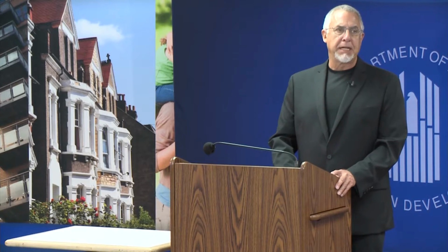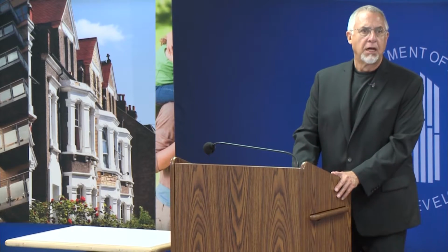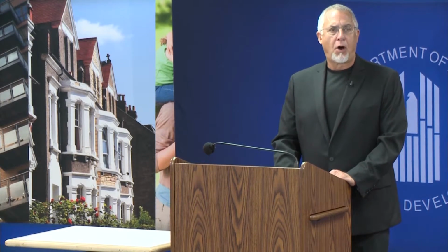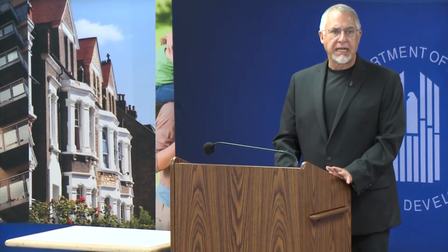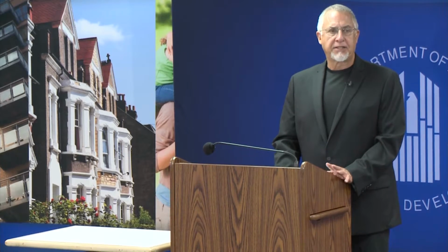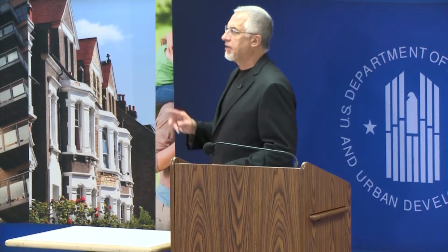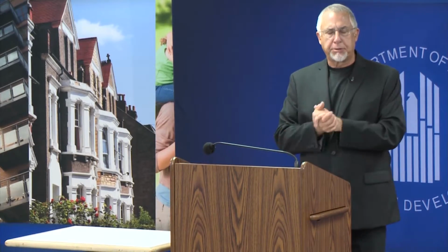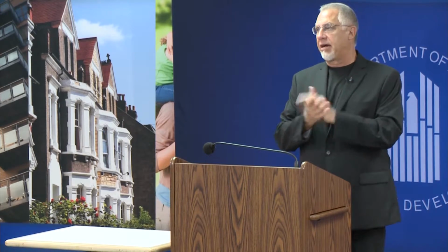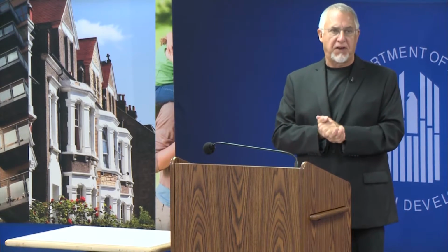That threshold has been increased to $3,500. So for all programs that is under the uniform guidance, the threshold is $3,500. Now, it's important to point out that we do have a program-specific requirement, however, for IHBG. And that program-specific requirement establishes $5,000 as being the threshold for micro purchases when using those funds.